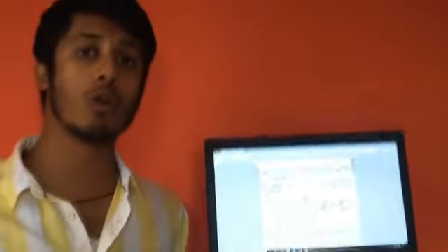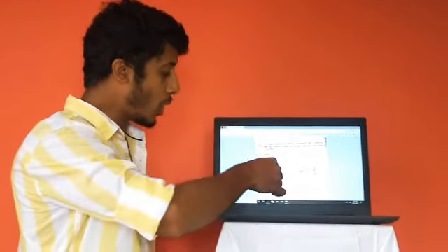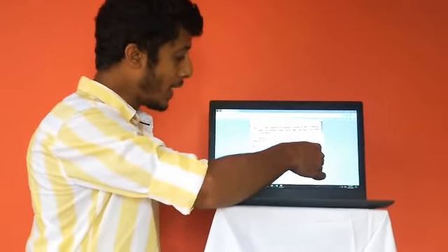For this way I got a total of 37 weeks, but in the first way I got a total duration of 30 weeks. Of these two values, 30 and 37, 37 takes the highest position or first priority. On this basis I call 1 to 2, 2 to 4, 4 to 5 and 5 to 6 my critical path to complete my construction management activity for any project.